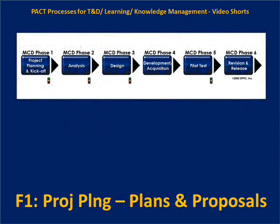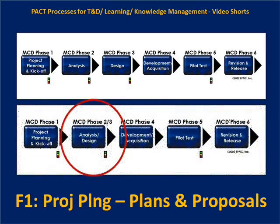MCD projects can also be reconfigured. In this next example, phases two and three have been combined with only one gate review meeting — this must be a conscious decision made collaboratively by suppliers and customers. The risk is: what damage can be done if we do analysis and go right to design without checking in with the client to make sure the analysis data is correct and reflects the new approaches the client is wishing for, rather than too much of the old school methods? That's what has to be safeguarded against.